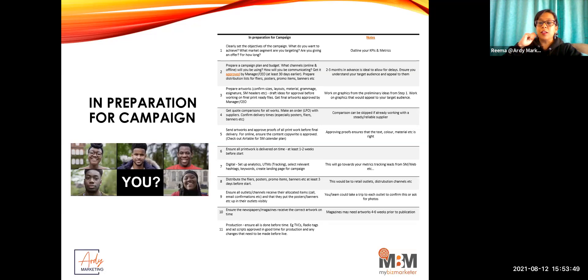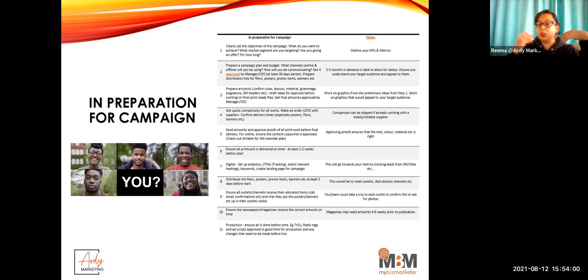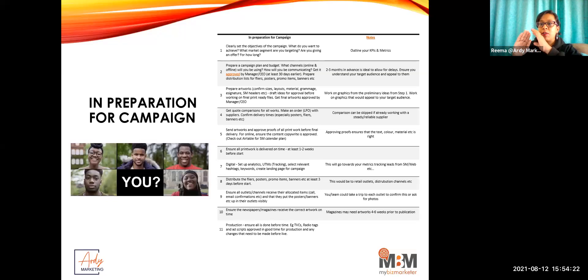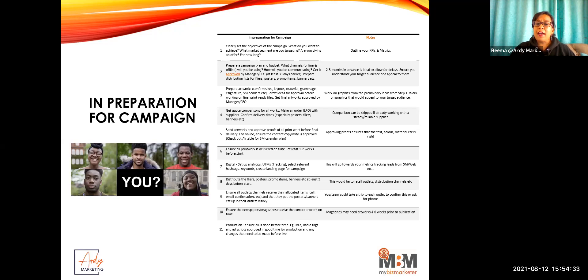Give yourself enough lead time for approvals. For print work, you need a proof from the printer — this is approximately what your artwork will look like: are the colors right, is the layout right, is it cutting off at the edges? Give yourself a lead time on that. Have your prints ready at least one to two weeks before your campaign starts, because you also need to distribute them — especially for a country-wide campaign.